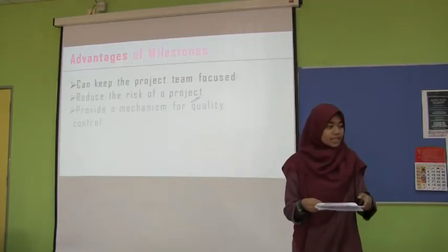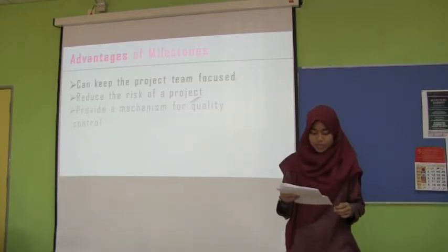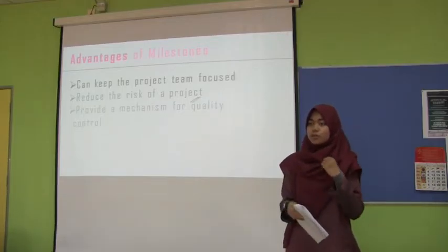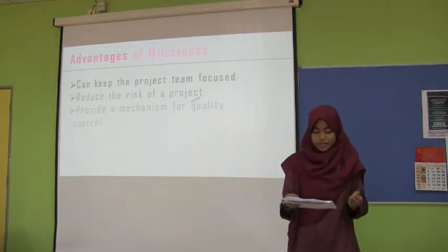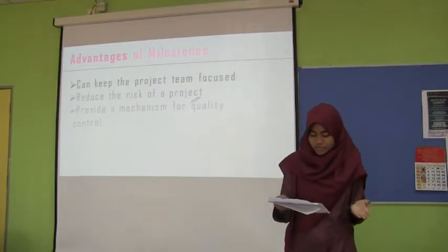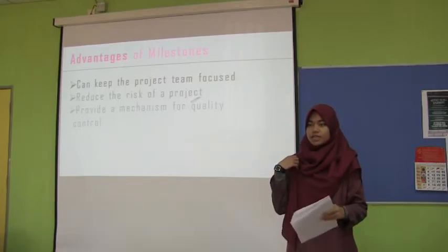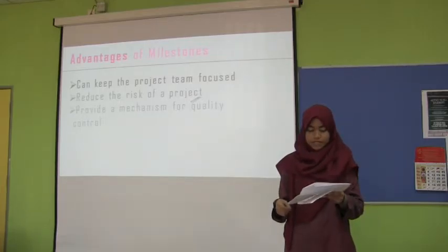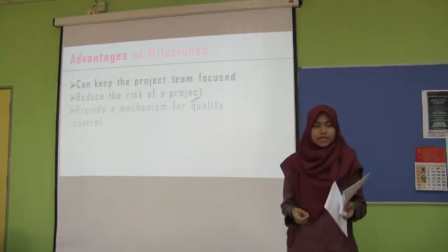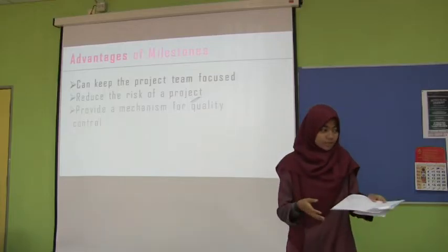And the second advantage of the milestone is it can reduce the risk of the project, because it provides the opportunity for the project team to review the progress of the project, and the project team can add resources committed to the successful completion of the certain project, where it can add the appropriate plan and steps that can be taken to the project to meet the milestone.